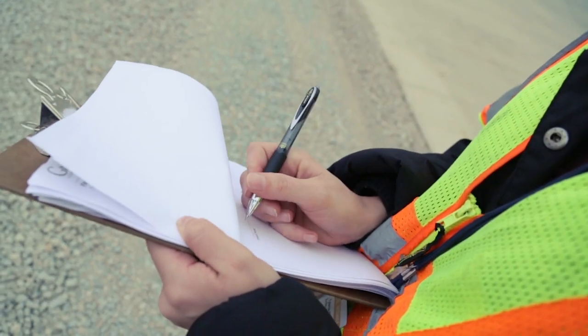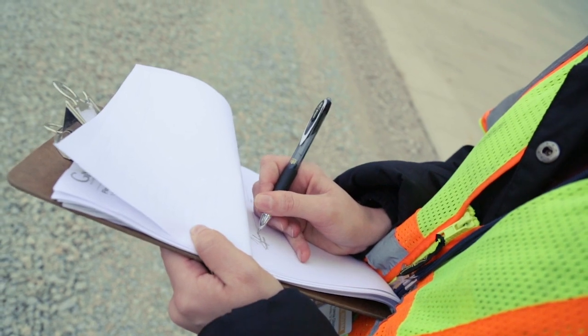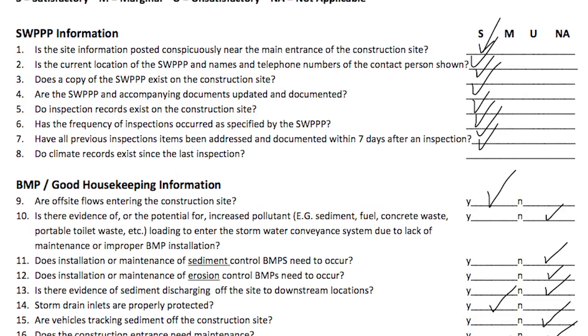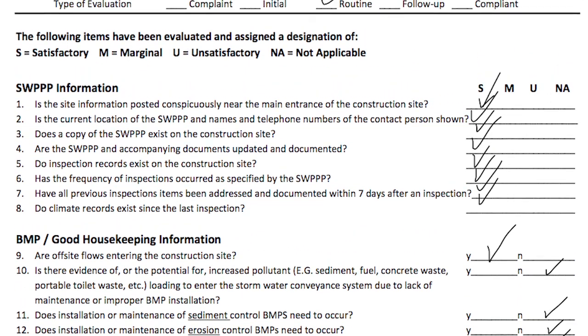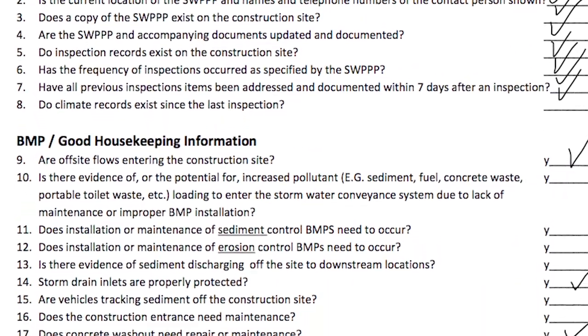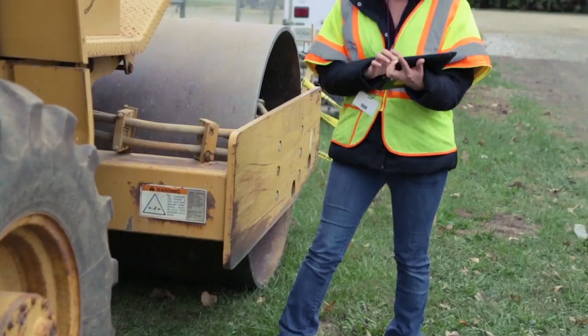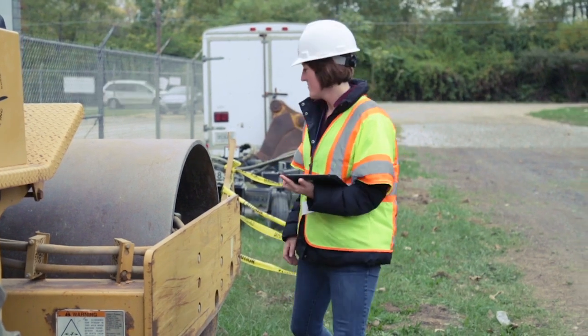Complete the written inspection report while on site. Whether you use hard copy or electronic, you should have a copy for yourself and one to leave on site. Be very specific about the problem and location of the problem. Reference the ordinance or other authority on the report.